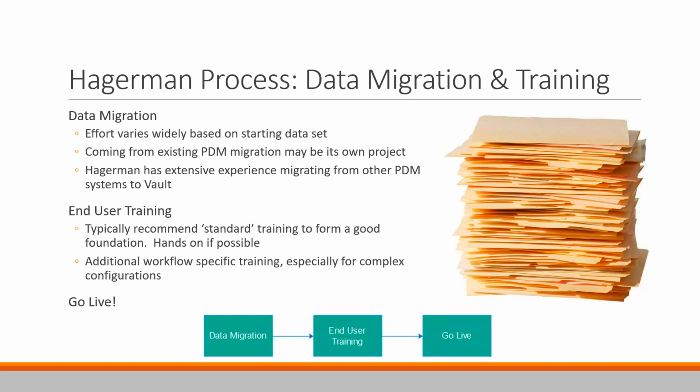End user training follows. Standardized training can happen in parallel with some of the data migration stuff, the specific environment training. And then of course you flip the switch and people start using it.